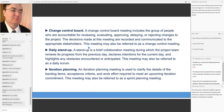The next important term is the Change Control Board. A Change Control Board meeting includes the group of people who are accountable for reviewing, evaluating, approving, delaying, or rejecting changes to the project. The decisions made at this meeting are documented and communicated to the appropriate stakeholders. This meeting may also be referred to as a change control meeting.